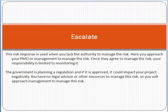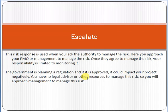Escalate means that if there are limitations in your authority and you cannot take action on a risk, you escalate the matter to senior management or the PMO head so that they can handle it. For example, if the government is planning a regulation that could impact your project and you cannot take action due to your authority level, you escalate the matter to your CEO or head of project management. Escalation applies when there is any limitation in your authority or action.